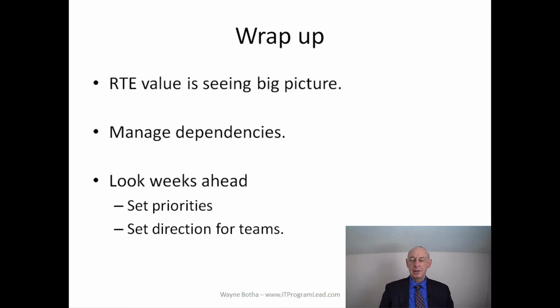Okay, so let's wrap this up. The value of a release train engineer is to see the big picture. Of course, it's not the only role of a release train engineer, but it's a large part of the value that you bring. Manage the dependencies between the teams and the lead times. For example, if a team needs a firewall to be opened for their testing, there's usually a lead time to get a firewall change implemented.